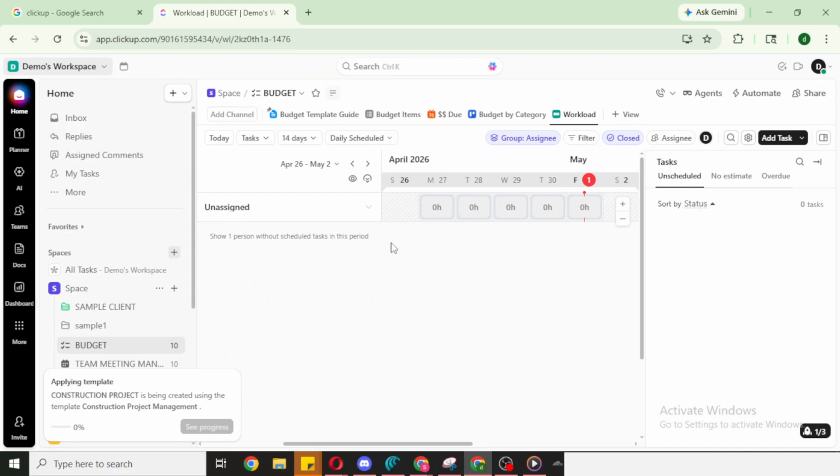Dive into tasks and review the fields that matter most. Set clear due dates and priorities, and make sure assignees are correct so ownership is obvious. If the template includes custom fields for items like cost codes, RFIs, submittals, or change orders, tailor those fields so they match the way you track and report. This makes roll-ups and dashboards far more accurate.